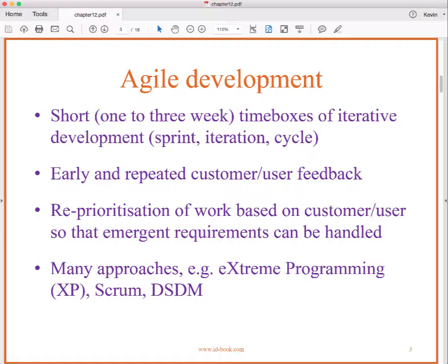And so if you discover that requirements have changed, or you discover new requirements, you can document those and decide to include them in the product backlog, which is simply a collection of the user stories that you've committed to. And then every time you come to a new sprint, when you go to plan it, you pick the most high priority group of user stories that you think can fit into the sprint. So that's how you would do it with Scrum.